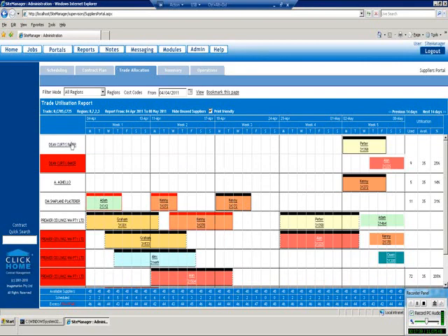There is one line that we can't see on this set at the moment. So if there is work that is unallocated, it will show as a row called unallocated at the top here, where my mouse is moving, and that will run across the top, and that will show all work where the task has not been allocated to a real supplier, whether that be a to-be-advised supplier or whether it just be blank. And that obviously is another assistance for the construction manager or the central scheduler to identify ones where they need to bring them down into real people and load up their work.